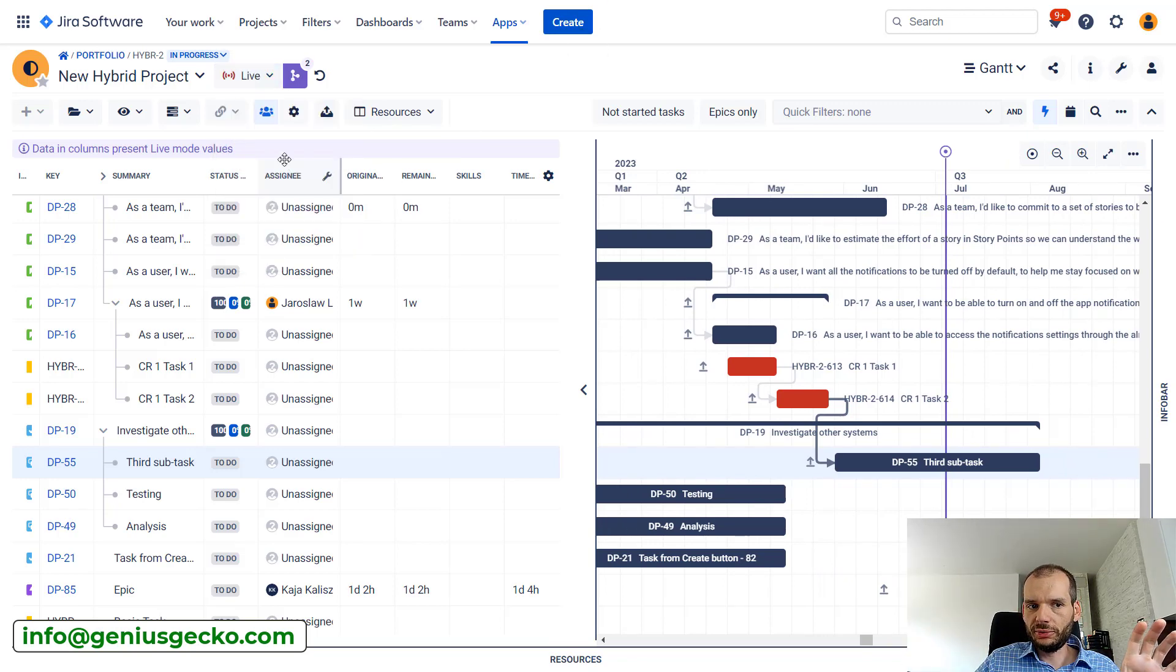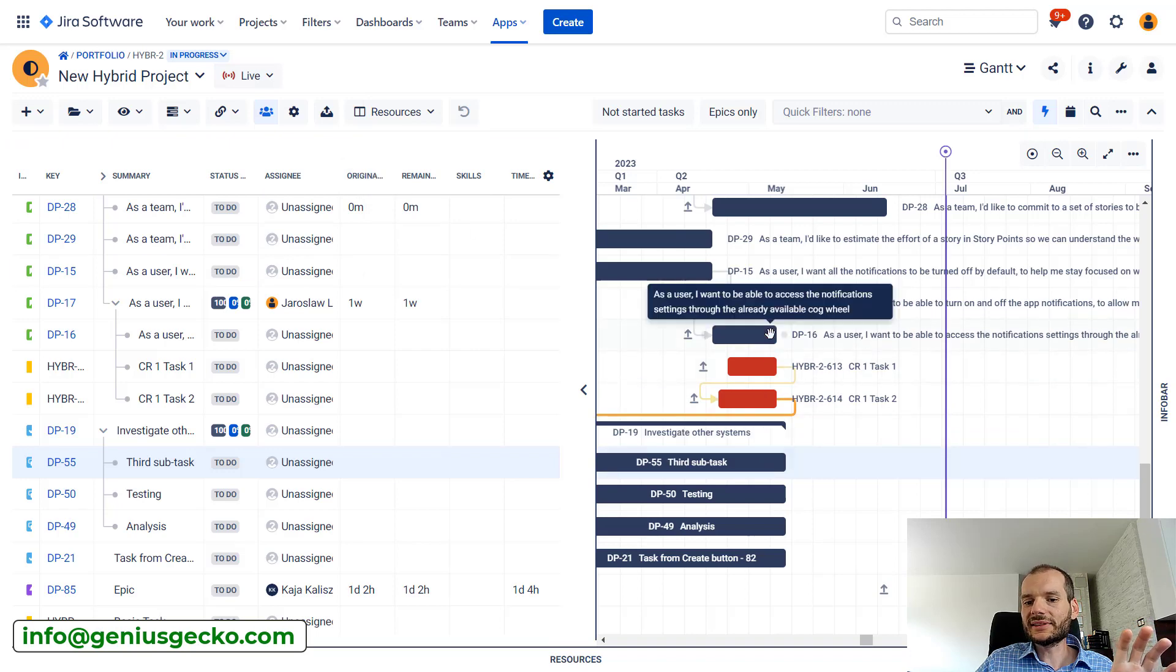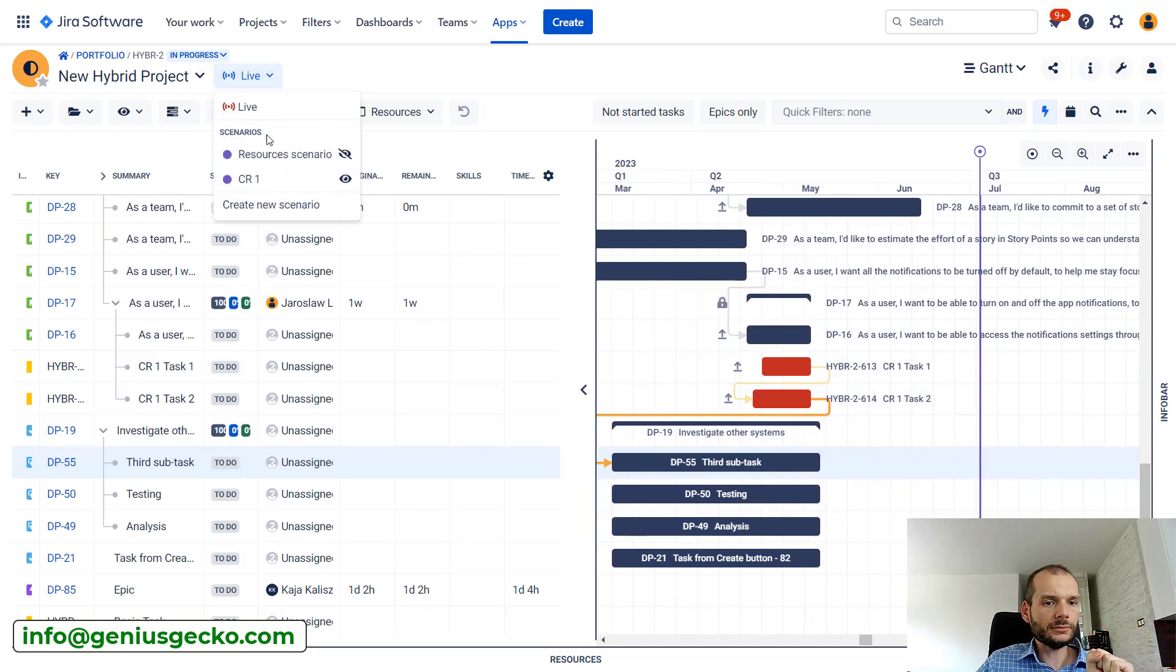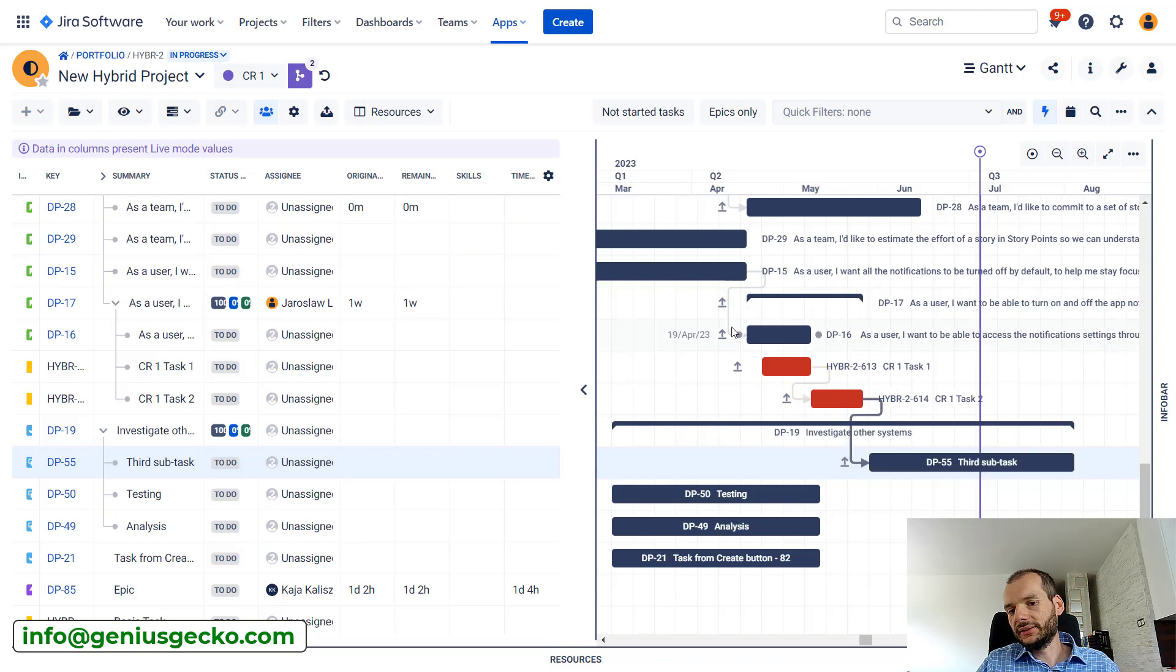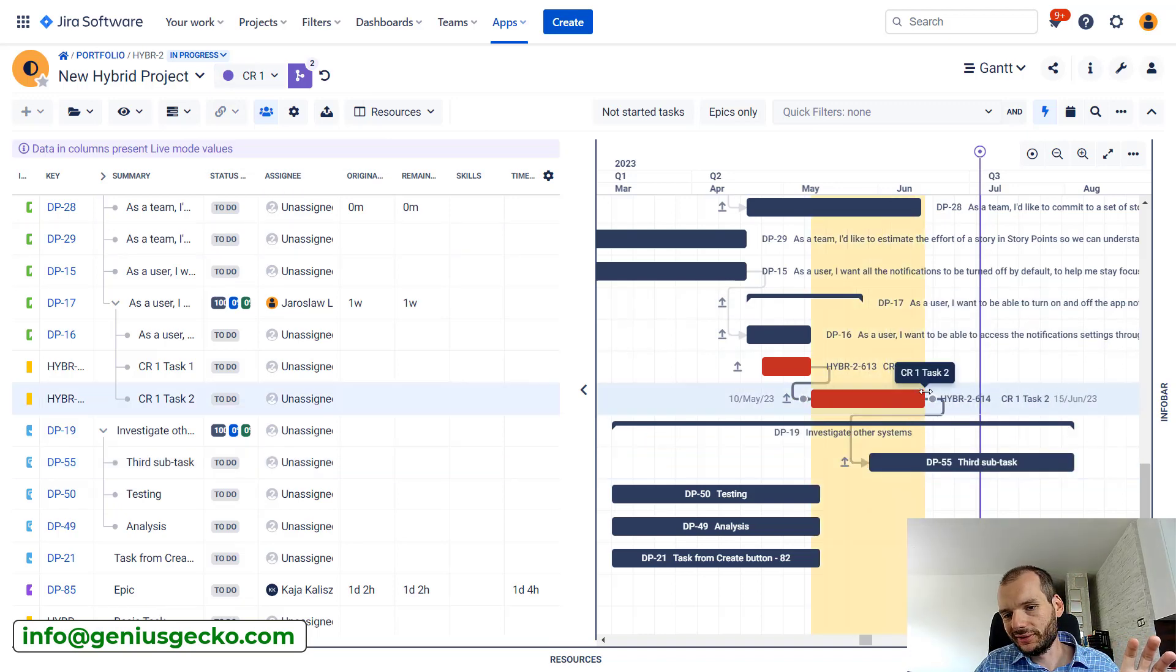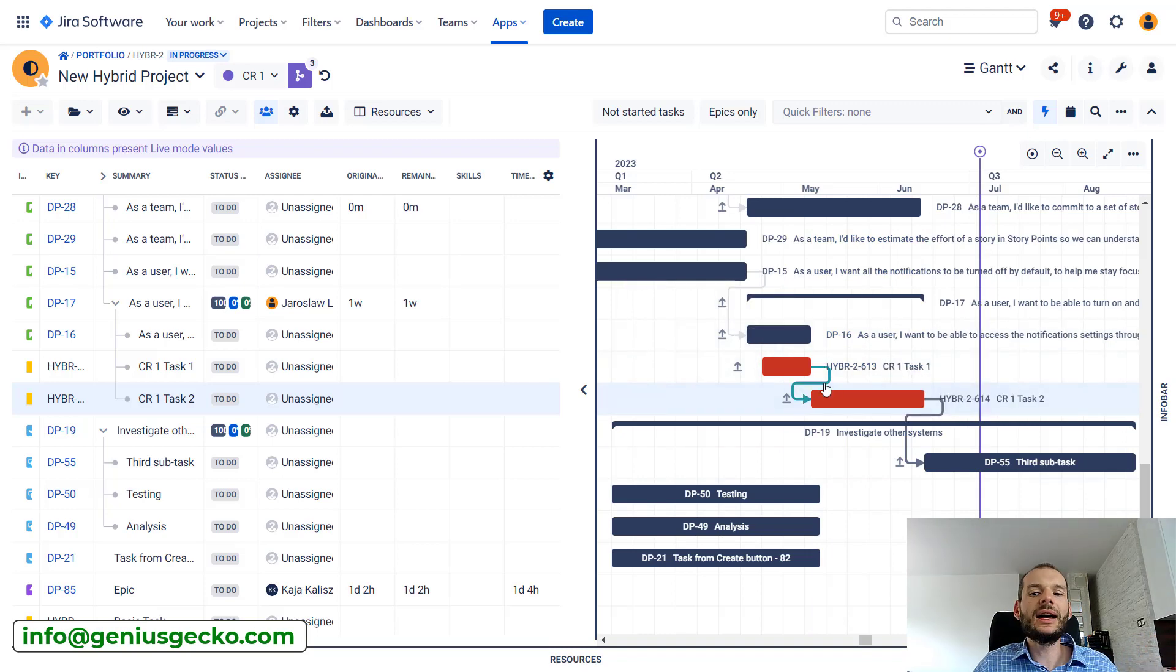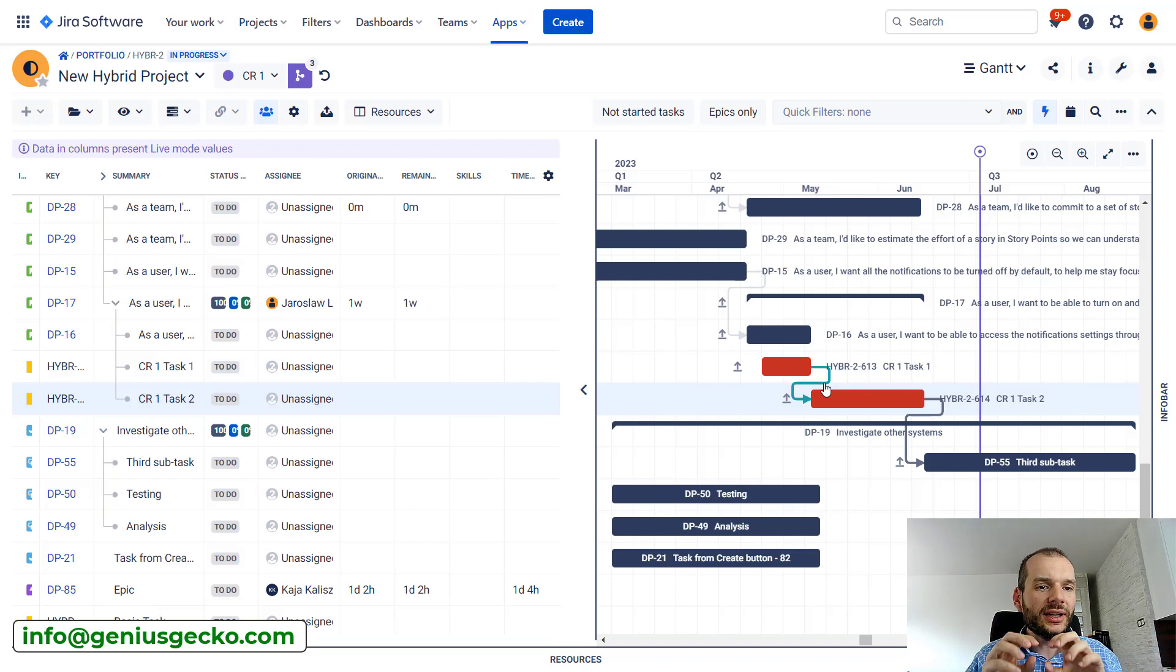I will switch for a moment to the live scenario. You'll see that in the live scenario they are still as they were. So yeah, we can do the replanning. Let's say that this task will in fact be longer, maybe somewhere over here we need a lag time in the dependencies. But basically we can do the whole planning without impacting and updating JIRA issues.